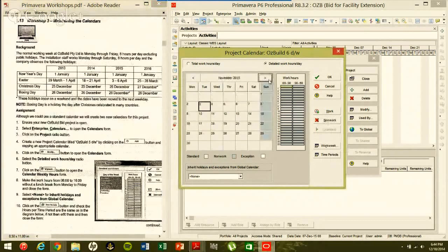Again, keep an eye out on the calendars as you scroll through just to make sure that only Sunday is a non-work day aside from the ones that you're putting together. Now we have the 25th and the 28th, and I know this because I've gone over it, but the 26th will also be considered a holiday, as it will state later down the line. So we're going to make that non-work. Go to my 2016.